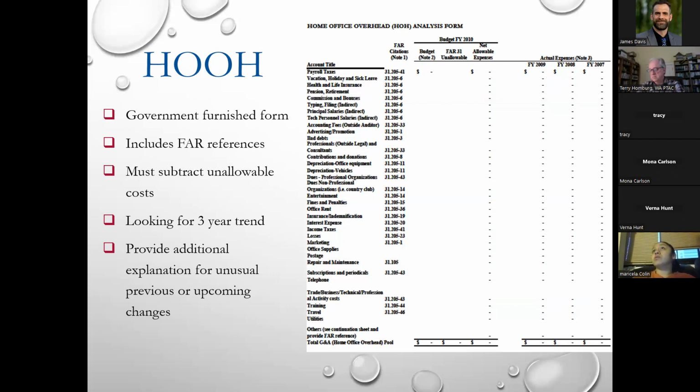A sole source contract award or a modification with a prime contractor as a sub, you have to give cost detail. Cost detail then will have to break out directs and indirects. And they're going to go through it and say what's fair and reasonable, what's allowable and unallowable. So anytime you're putting together a cost proposal, meaning you're detailing your cost elements, you have to present this or should be presenting this. They could ask for it and they could say, tell me everything that is in your home office, your overhead, your G&A.